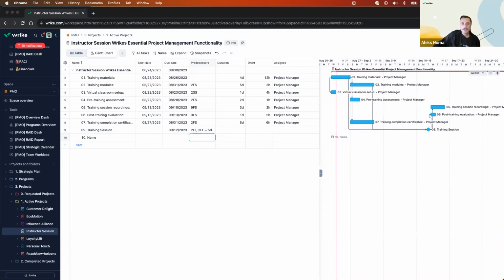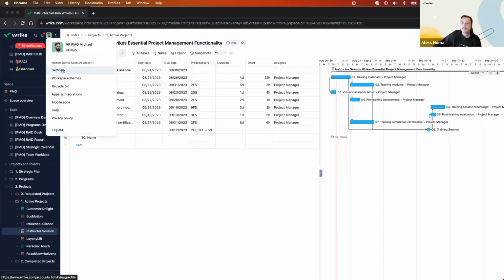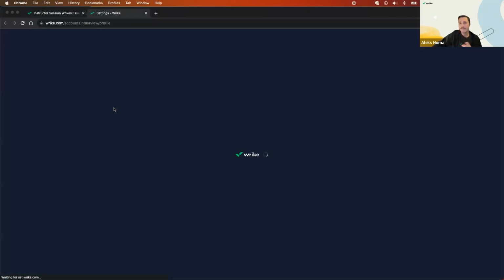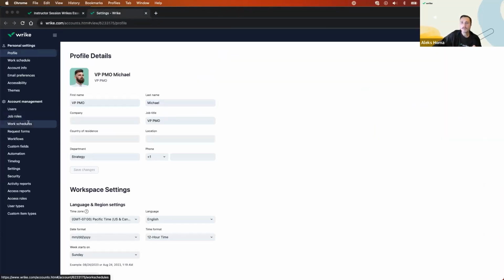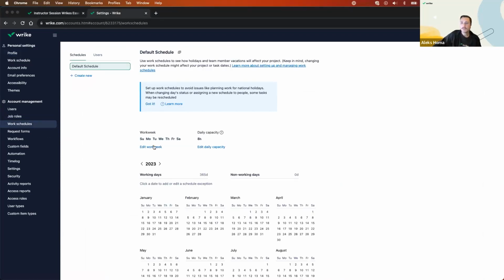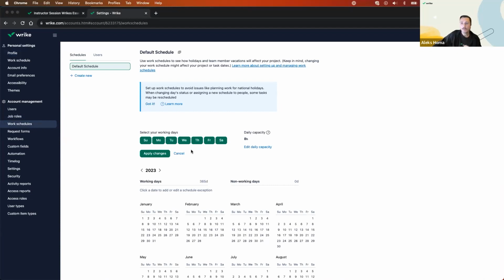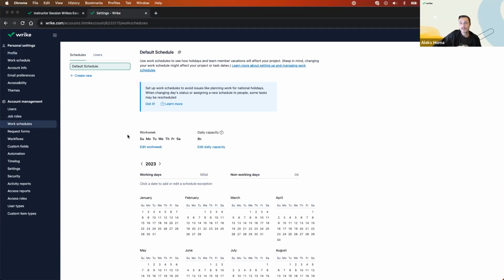Now, I've got a question: can you set it up so that your days are only weekdays, not including weekends? Great question there, Deborah, and I'm glad that you asked. The short answer is yes. I'll show you how to make that adjustment by clicking on your profile picture and going to settings. Once you're in settings, if you're an account administrator or an account owner, there's an option to choose your work schedules. So you can edit your work week to choose only the weekdays rather than weekends. Because I've got examples of events that are happening on weekends here, I'm going to keep my demo instance working 7 days though. I hope that answers your question there, Deborah.